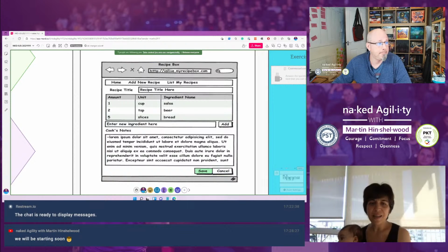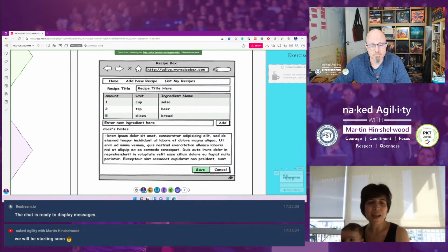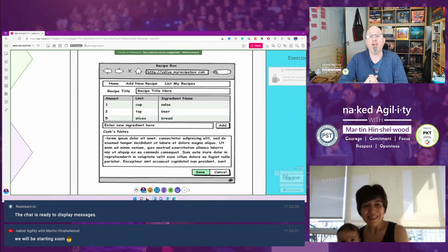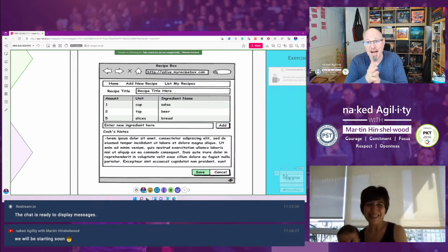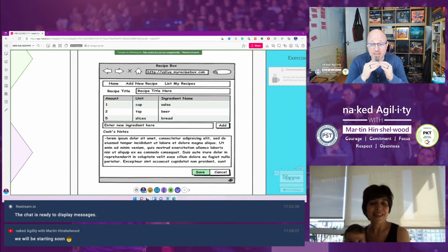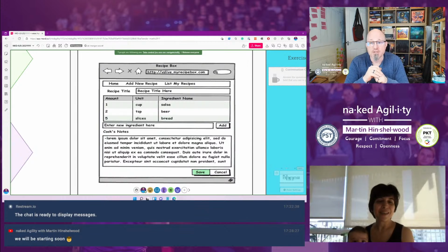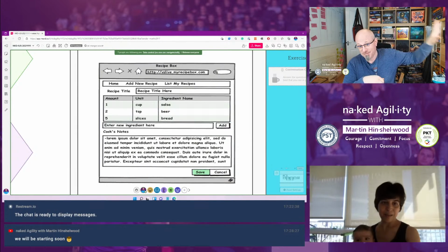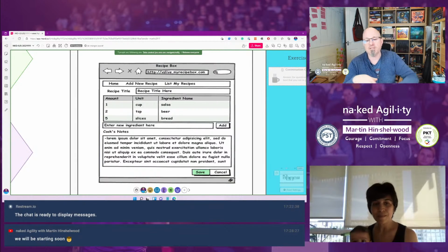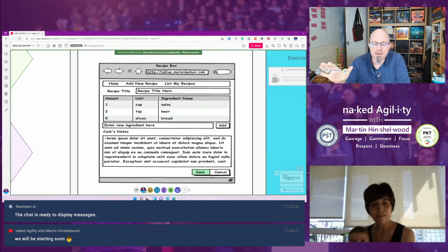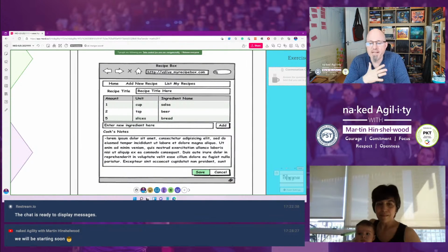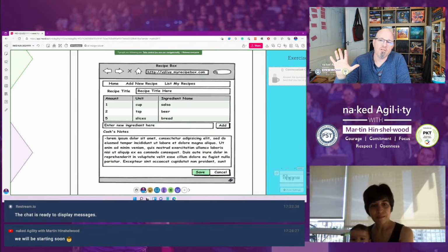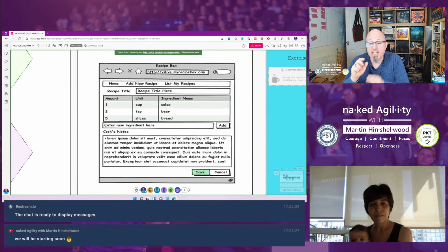Normally relate the acceptance criteria to the definition of done. How wrong am I? Very wrong. Definitely very wrong. So that is a common conflation between those two things. So acceptance criteria are to do with the requirements, right? Acceptance criteria go on the requirements. Definition of done is about the quality of what it is you're creating. So regardless of what it is that we deliver, it all must meet the same quality level. But that's a really common one.